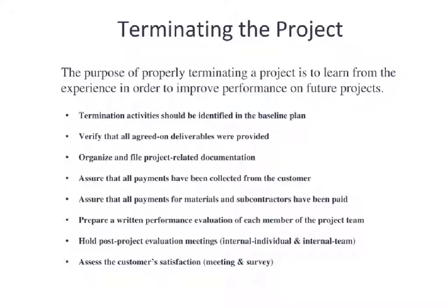First of all, termination of the project begins with the project. Now that sounds weird, that we start terminating on the first day of the project, but in a way you do, because you plan the termination activities into the baseline plan.